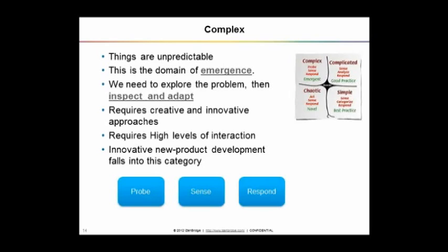For example, if you are following Scrum, you are producing some working software and then you are trying to identify the customer behavior, the technical behavior, and then adapting on the basis of how technology is reacting or how your team is capable of delivering things using that particular technology, or how the user expectations are moving from one direction to another on the basis of the probe or exploration you are conducting.